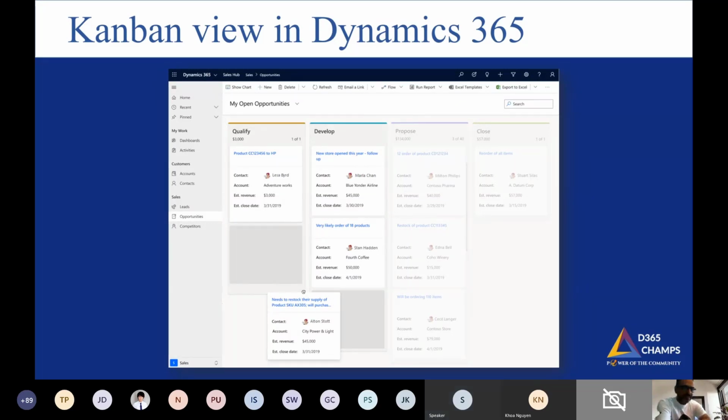Yes. And as I had mentioned, it is more about managing your workload, managing the load on your teams, managing your work in a more streamlined way. WIP limits, or work in progress limits, is the concept which makes sense when you move from grid view to Kanban view, wherein you can keep a check on how many activities to consider in work in progress at a certain point in time.